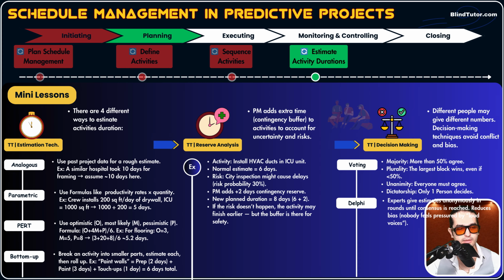Okay? Guys, for example, we want our experts to estimate activity X's duration. We get our first round of results. One expert says 3 days, another one 5 days, then 7 days. Now I analyze the first round and distribute the reasoning for each of these experts. Each of these experts estimated based on reasoning, based on facts. I distribute new reasonings and facts.